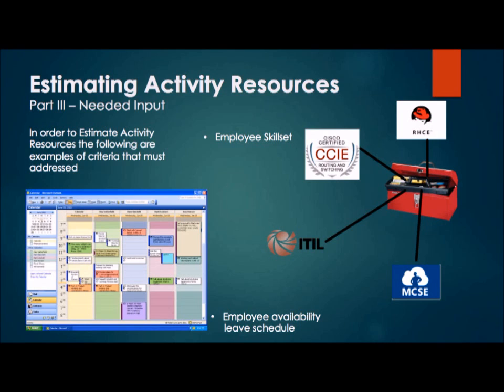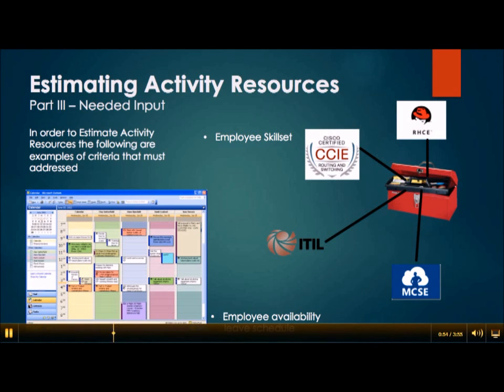Is there anything unique in the project scope statement that will affect the resources? What is the organization's history in doing similar activities? Has the organization done similar tasks before? What level of personnel did the work? Does the organization have people, equipment, and materials that are capable and available for performing the work? And also, are there any organizational policies that might affect the availability of resources?